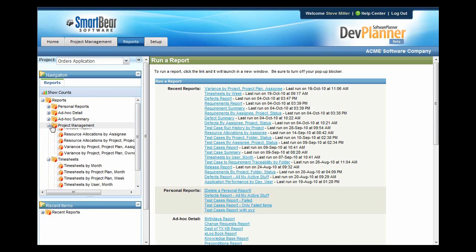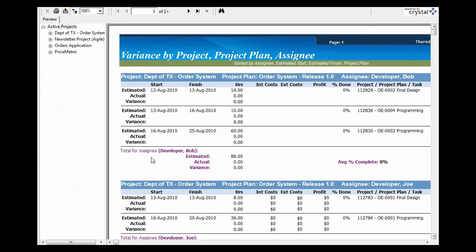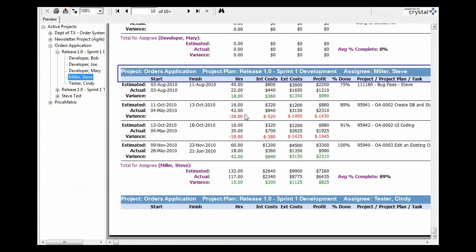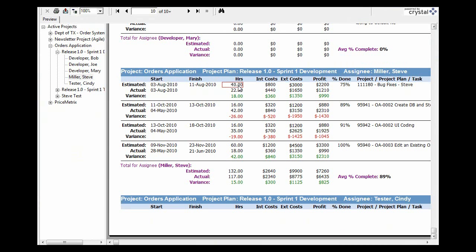Let's take a look at a variance report. From the variance report, you can compare project to project. You can drill into a specific project and a specific project plan and look at each person on your team and see how they contributed. For each task that they've been assigned, it shows estimated hours as well as actual, and then it'll show you a variance. You can also see what percentage complete they are. Notice if they finished earlier than you expected, it turns green. If they were overdue or over-allocated, it turns red.